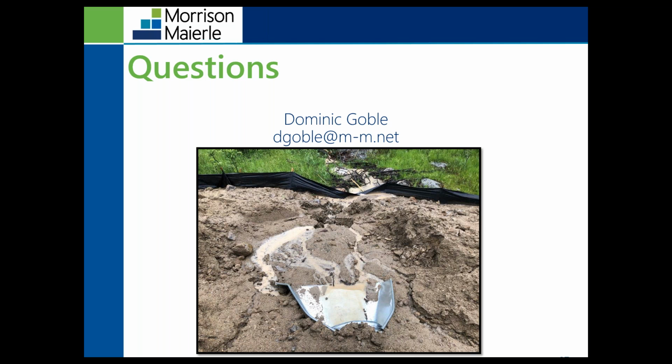If you do have a project that is, say, on an Indian reservation or something similar, you have to go through EPA's application process. You have to get the EPA stormwater discharge permit. You have to go through their requirements, and it is different than the state of Montana's, as far as what the submittal and the form look like.